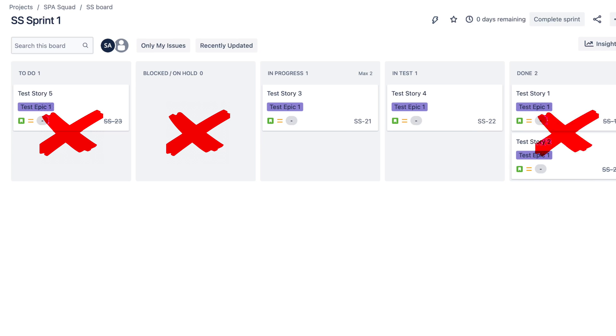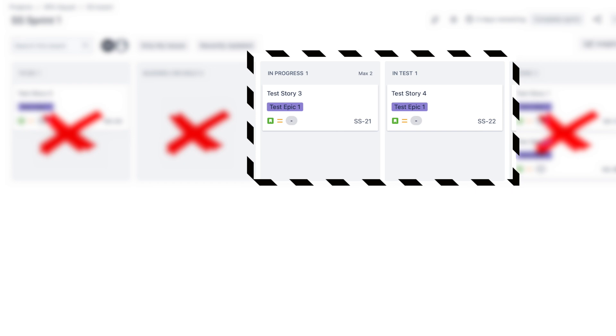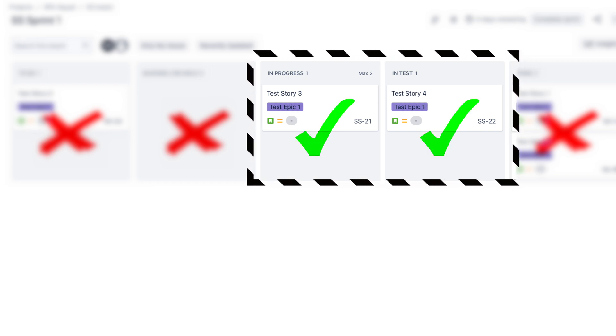We'll also exclude any time a story spends in blocked on hold, because that's also inactive time. And we also exclude done, because when a story goes into done, we're not working on it because it's finished. So we just need to add up all the time a story spends in our active workflow states — in this example, that would be in progress and in test. Now the data is automatically getting tracked by whatever agile tool you're using; you simply need to extract it. If you're using Jira, check out the video on screen now to see how to do it.